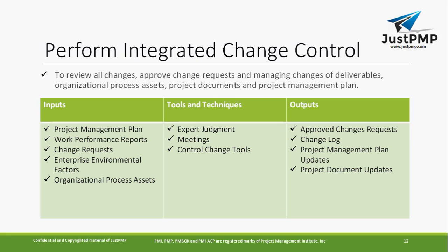Integrated change control is in the exam. They will give you scenarios, for example, the customer has requested a high priority change and it needs to be taken. Can the project manager accept that change? Every time you should keep in mind that you cannot accept changes blindly. Any change, small, large, or even one that does not affect anything, should go through Perform Integrated Change Control.